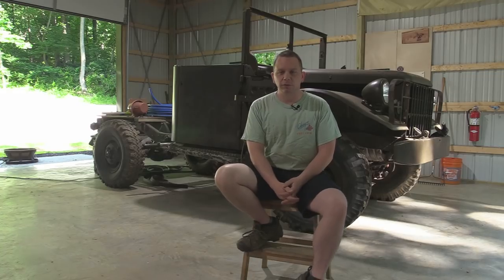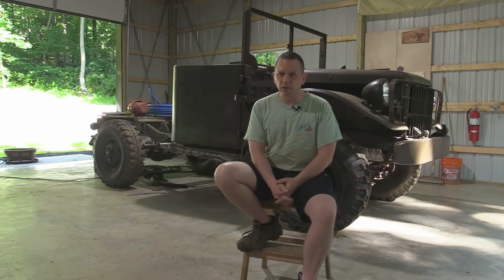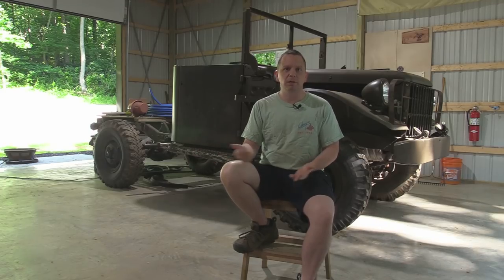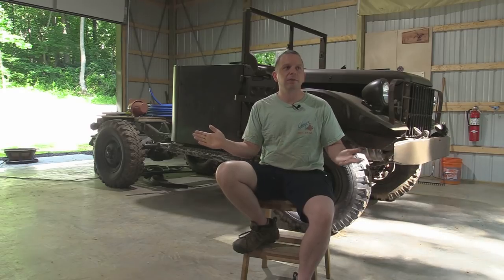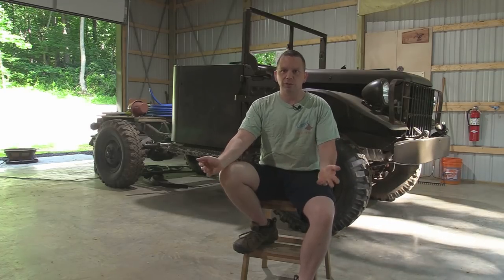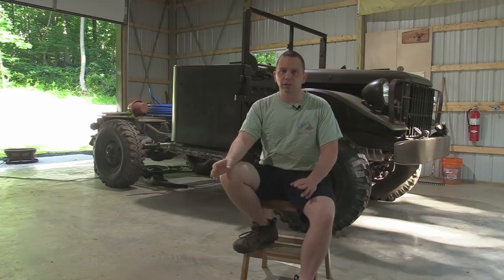All I could say is if you're gonna do a project like this, be prepared for it to take way longer than you think it's gonna take and obviously cost more than you think it's gonna cost. Now I could do a whole cost breakdown on this project at some point, but to sum it all up, this project cost about $150,000. I had originally budgeted $75,000 for this project and it just quickly got out of hand. And one thing I really underestimated was how much dirt work costs. Moving dirt, having dirt delivered, the machines it takes to move the dirt, the maintenance on all of them. It really caught me by surprise.